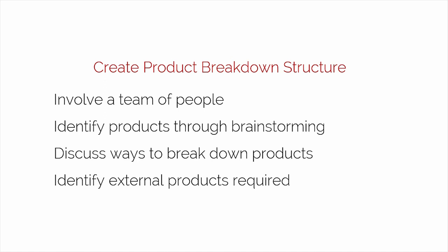In the mobile phone example, if ready-made batteries for the phone are being procured as part of a separate project and also used in the cell phone project for its assembly, the batteries would be considered the external products. The project manager is not accountable for the external products. For each external product, there should be a corresponding entry on the risk register, since it may have an impact on the plan and in turn affect the project.